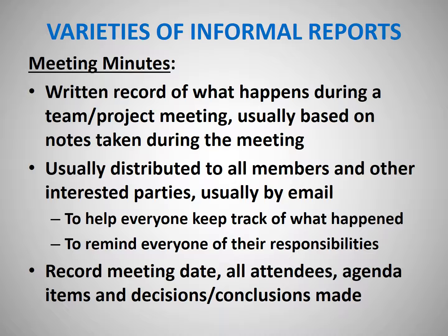So when you write meeting minutes, you always make sure that you include the date of the meeting, the names of everybody who attended, what the agenda items were, what the key points discussed during the meeting were, and then, most important, what decisions or conclusions were made. A very important role of the meeting minutes is to clearly articulate what decisions were made, what plans were made, and what conclusions were drawn, so that everybody has a shared, common agreement and understanding of what happened.